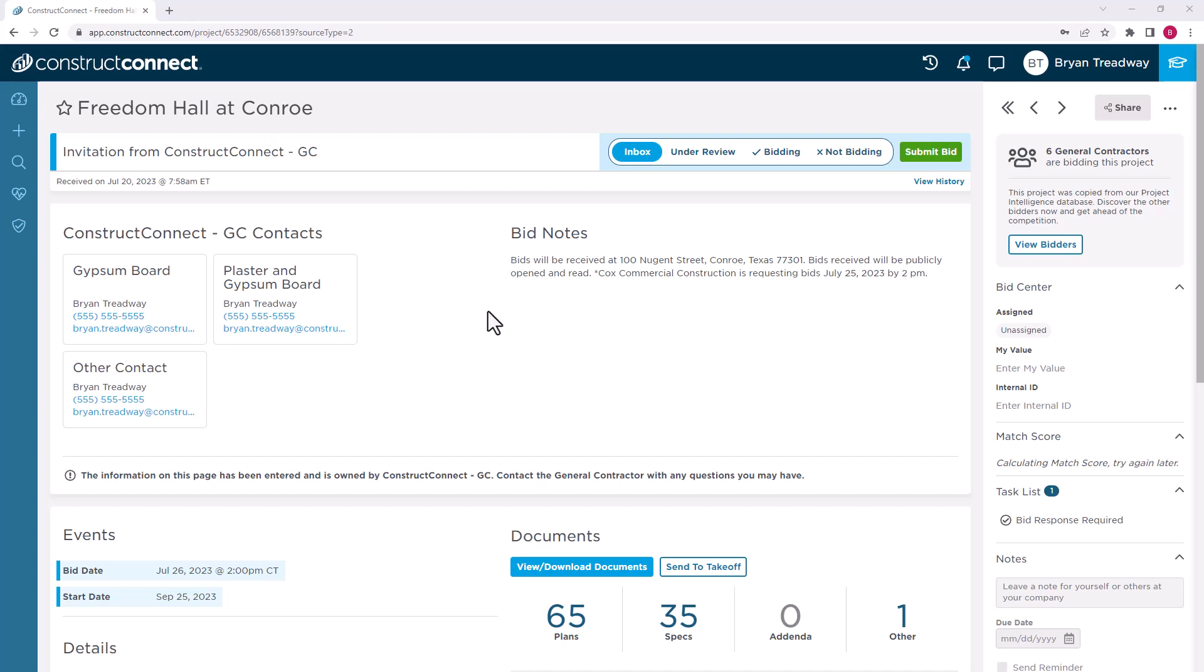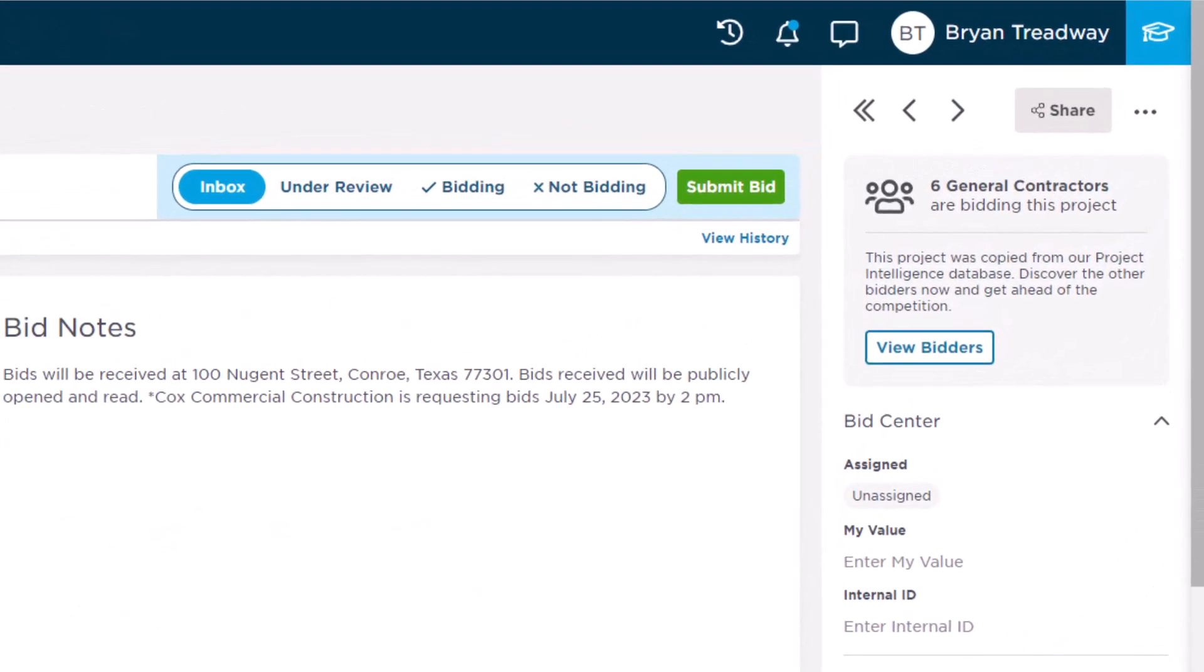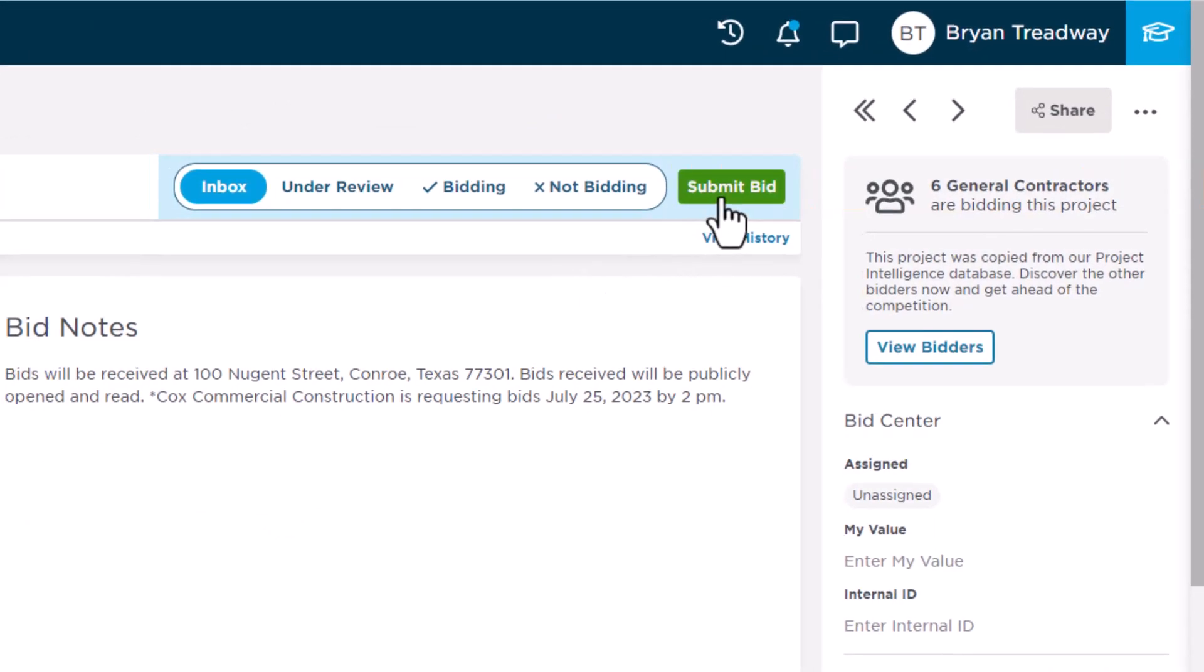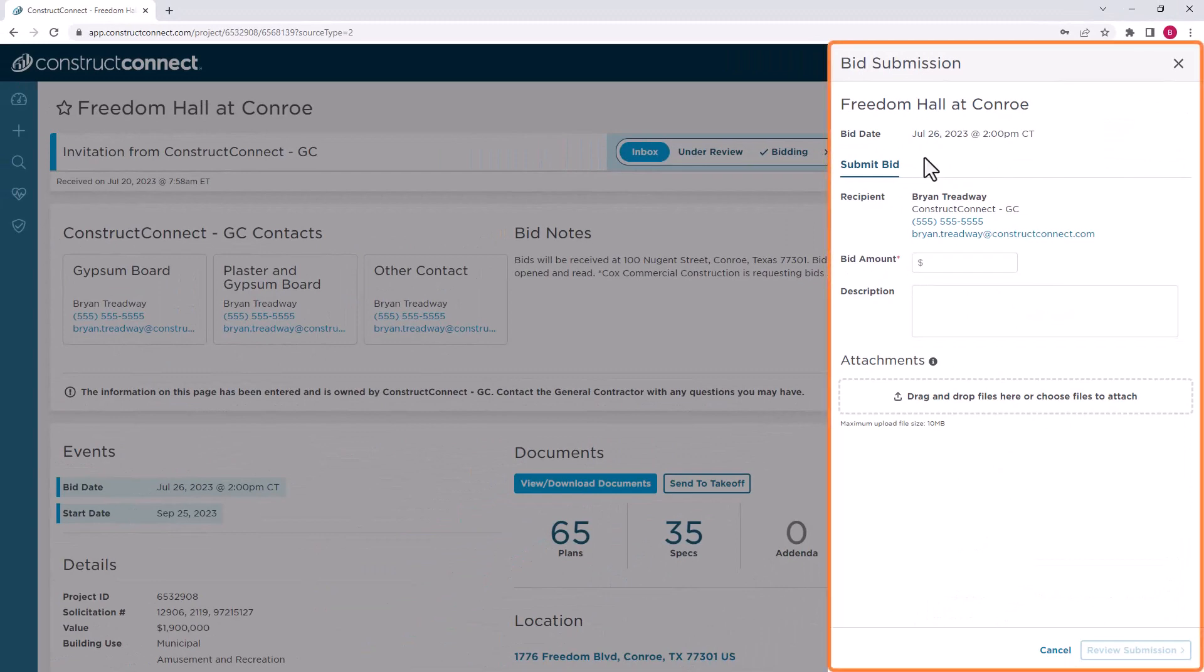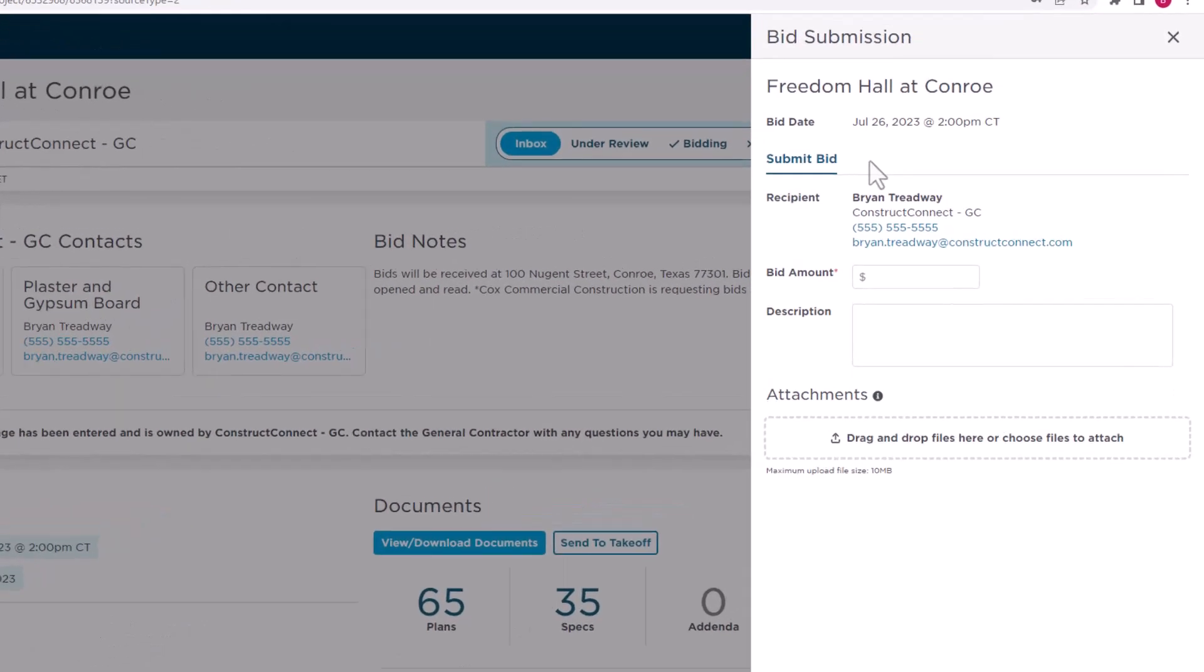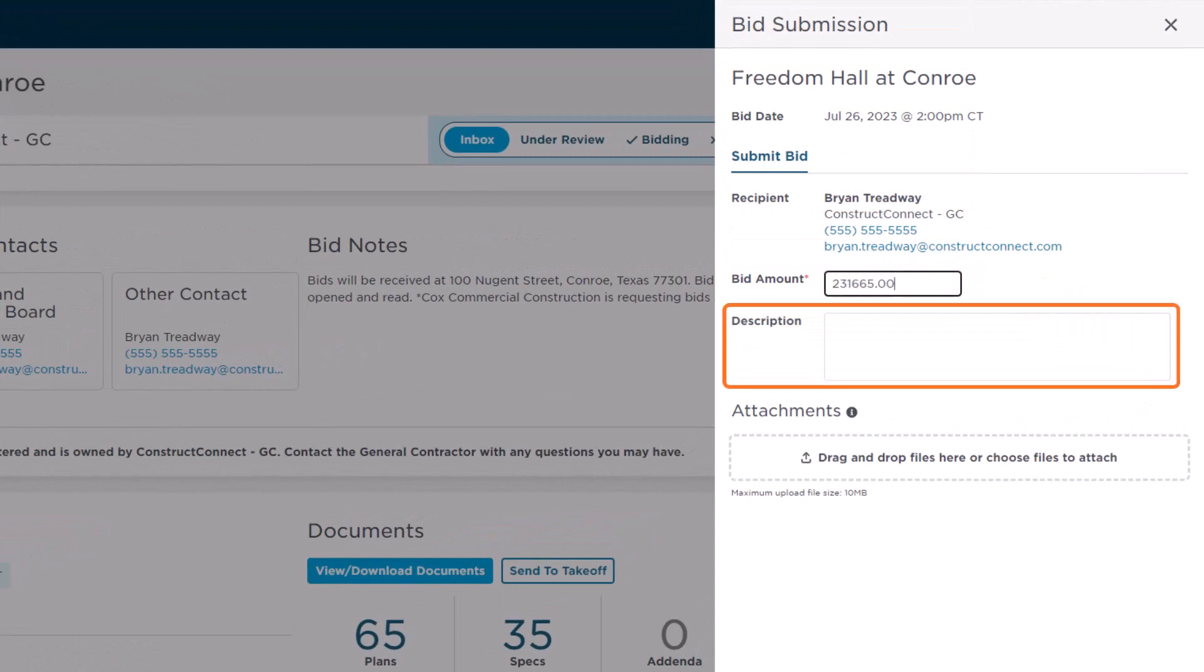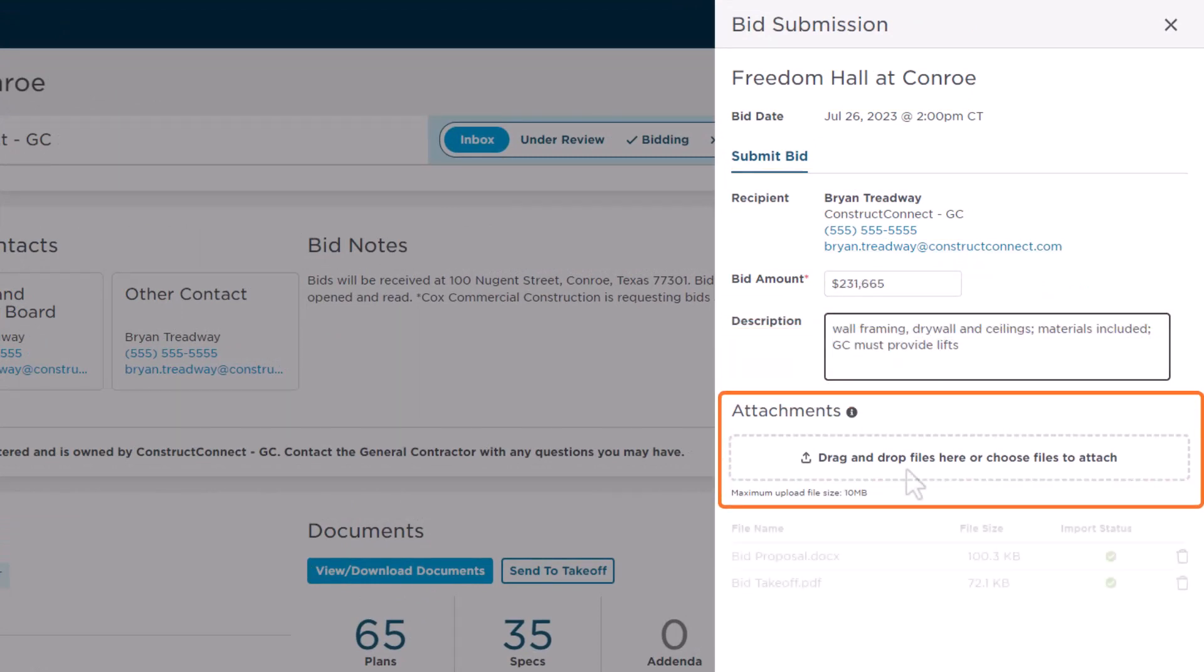Subcontractors invited to your project can easily submit their bid through their Project Details page in BidCenter. By clicking on Submit Bid at the top of the Project Details page, a window appears, allowing them to enter in their bid amount, a description or any specific callouts about their bid, and upload their bid documents.